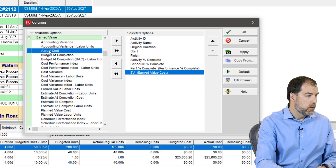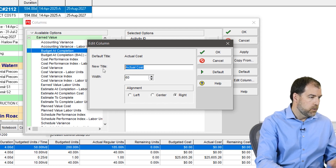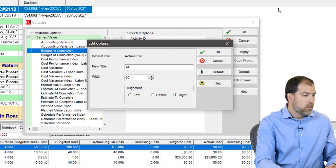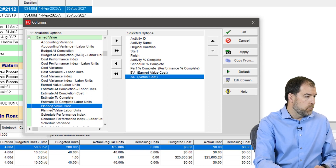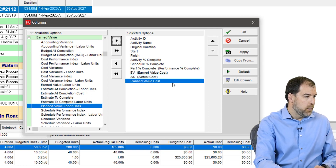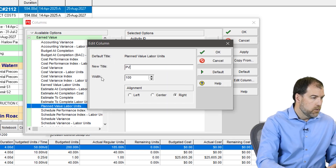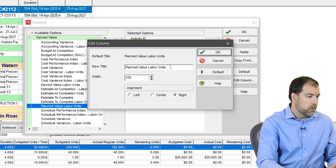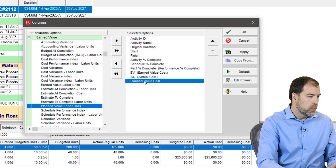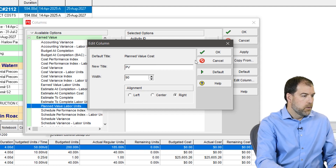We've got actual cost — add it in, edit it, and truncate it down to 'AC.' This kind of mirrors what we see in a lot of textbooks. Then let's grab our planned value cost, add that in, edit it, and call it 'PV.' Make sure you click in the field you want to edit before you try to rename it — otherwise you might accidentally be editing the wrong column. Another important field is budget at completion — let's add that in and rename it 'BAC.'